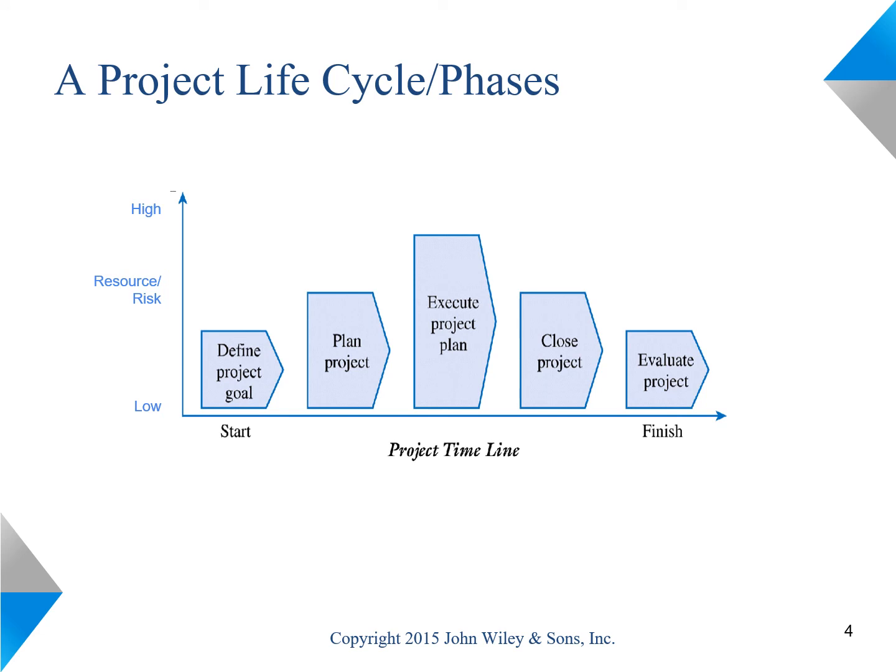Now, let's take a look at the level of resources and expenditures over the life cycle. As you can see, most of the resources will be used during the execution phase. So it makes sense to ensure that planning is done thoroughly so the execution phase is planned and executed without any delays or any changes during execution.